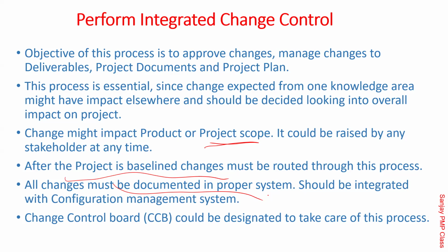This I think should take so much time. This should have the impact. Then the change committee sits down and says out of these 10, these 8 we are approving, 2 of them we are rejecting. Now those 8 will have to be scheduled for change. Then automatically appropriate configuration management changes need to be done, because it is recommending some artifact to be changed. So the artifact will get a new version number. Have you heard this word, something called checkout and check-in? Not in terms of a hotel.